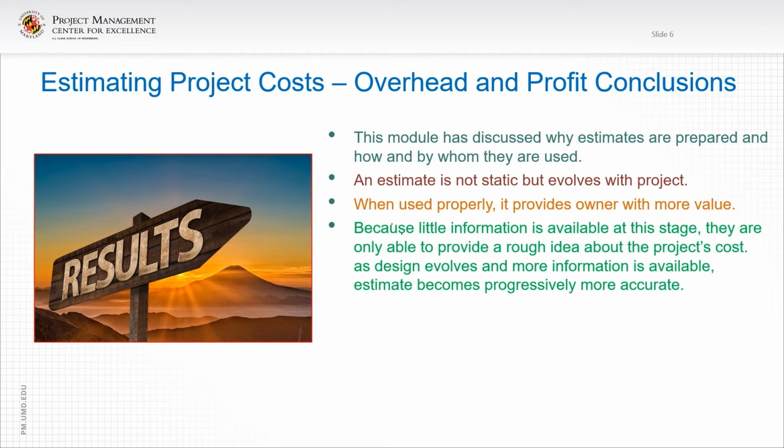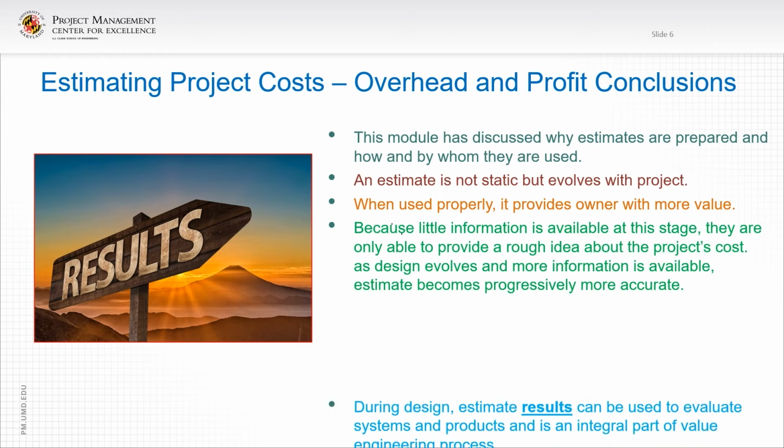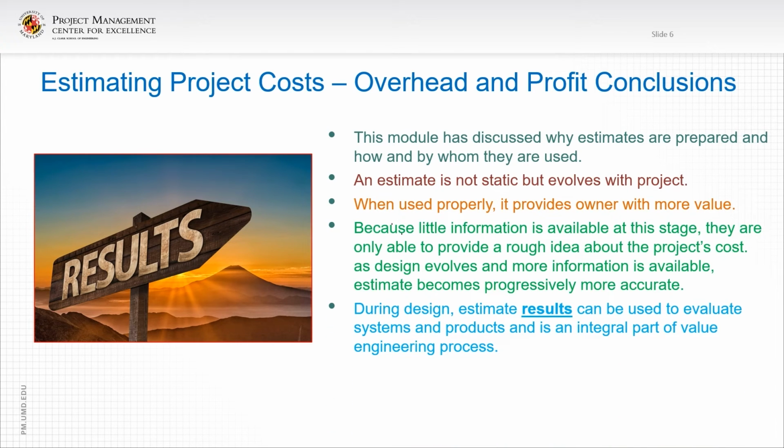Because little information is available at this stage, they are only able to provide a rough idea about the project's cost. As the design evolves and more information is available, the estimate becomes progressively more accurate. During design, the estimate can be used to evaluate systems and products and is an integral part of the value engineering process.